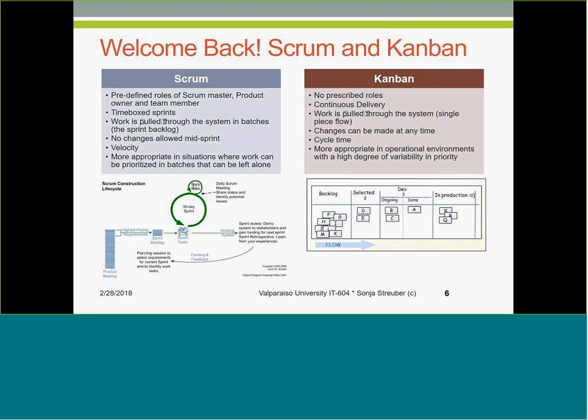And during that period, there's a daily stand-up meeting, 15 minutes, in which each team member answers the 3 Scrum questions or the 3 sprint questions, which are: what did I finish? What am I working on right now?